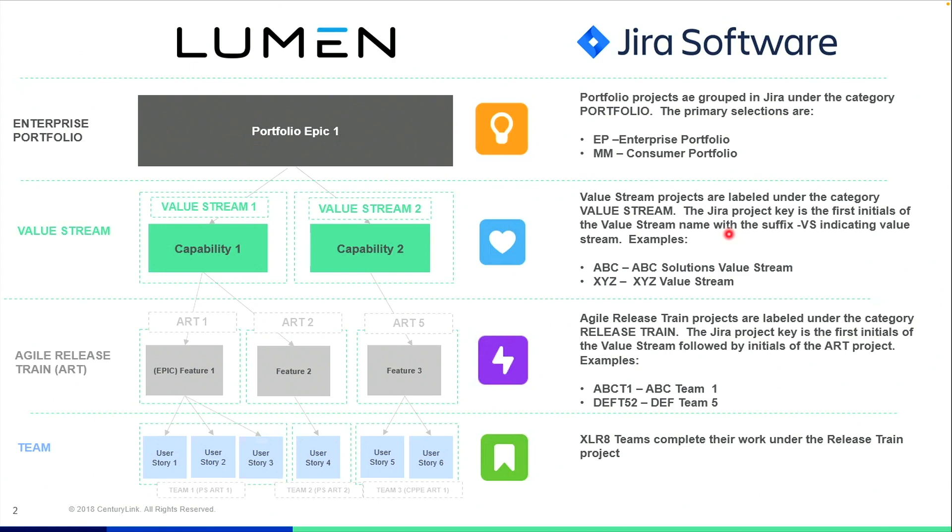Finally, our teams deliver their work in the release train under a specific sprint board. Our user stories are completed during a 90-day planning period known as the sprints, usually six sprints per PI planning schedule.